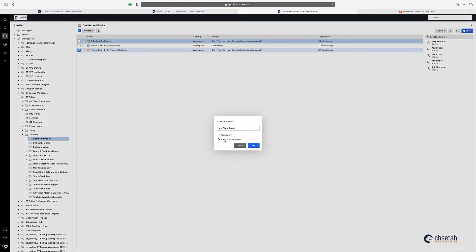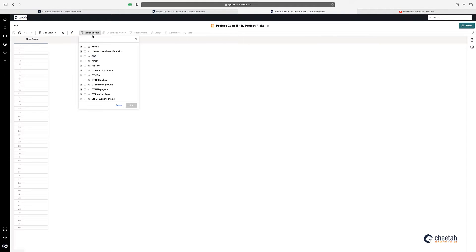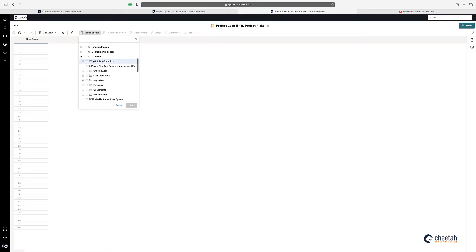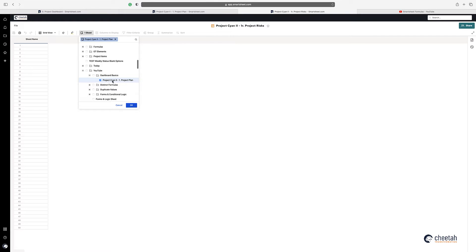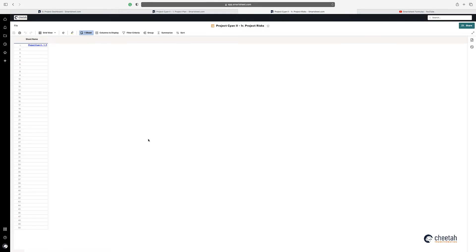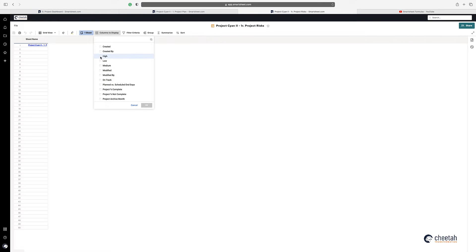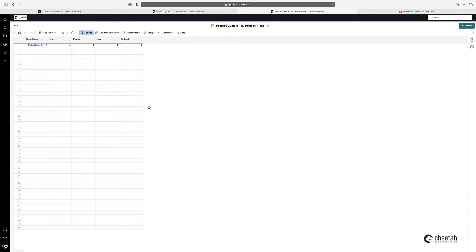I'm going to create a sheet summary report and call it 'project risks'. Then I just need to direct it to the sheet that I want to look at — that's the basics sheet and there's my project plan. Then I select what columns I want to display: high, medium, low and on track. The numbers I want to bring through — you can see it's brought the numbers through here.